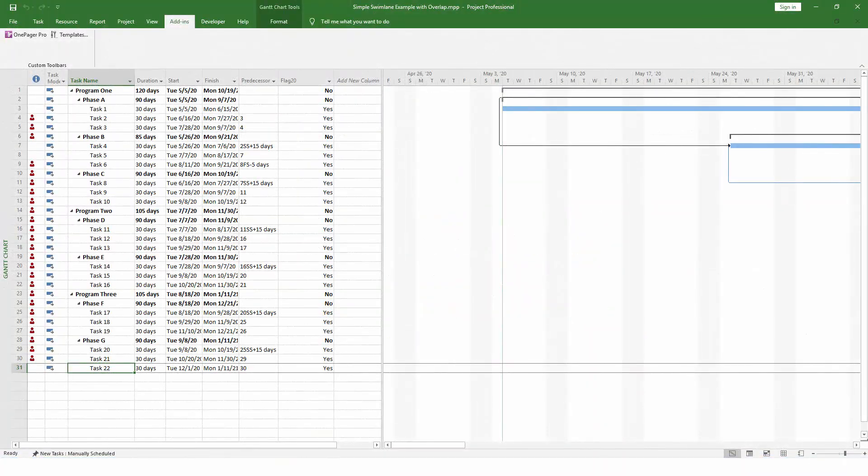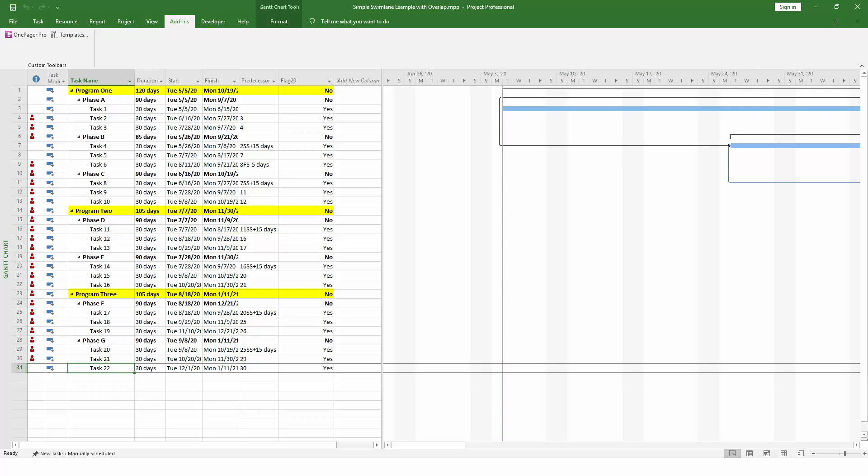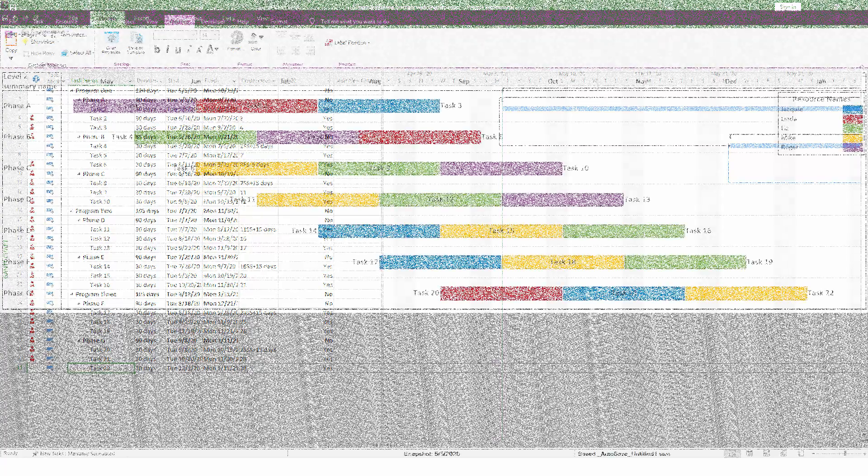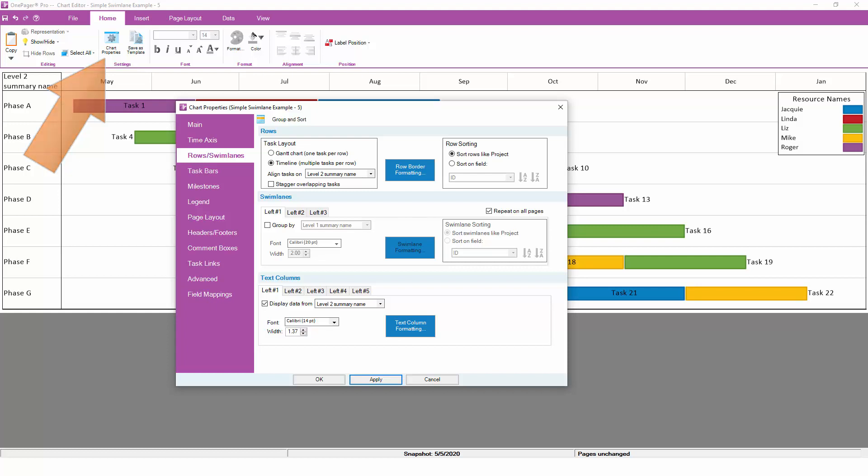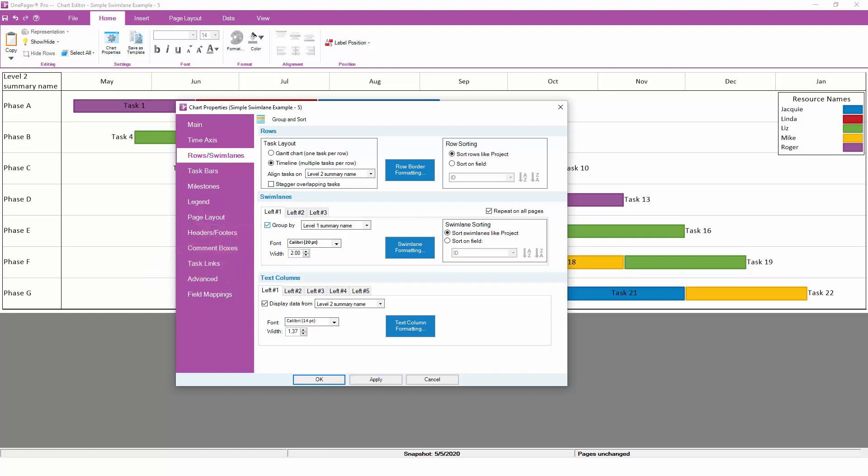Now, let's talk about swimlane groupings. Using the same project plan as before, notice that there is also a higher level parent task which OnePager calls the level 1 summary name. Underneath it are the level 2 summaries, and beneath those are the individual tasks and milestones. We can tell OnePager to set up a swimlane grouping so that any rows underneath the same level 1 parent will end up in the same swimlane. To do this, return to chart properties and turn on the leftmost swimlane grouping to look at the level 1 summary name.